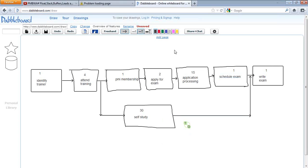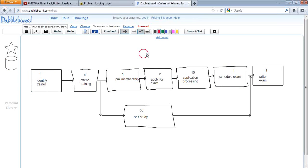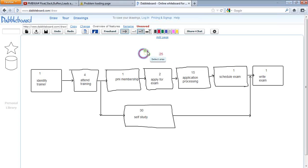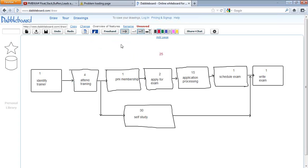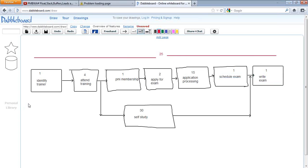This is our Activity on Node diagram. Now, which one is the critical path? If I take the horizontal path: 1 plus 4 is 5, plus 1 is 6, plus 2 is 8, plus 15 is 23, plus 1 is 24, plus 1 is 25. So the duration for this horizontal path is 25 days.